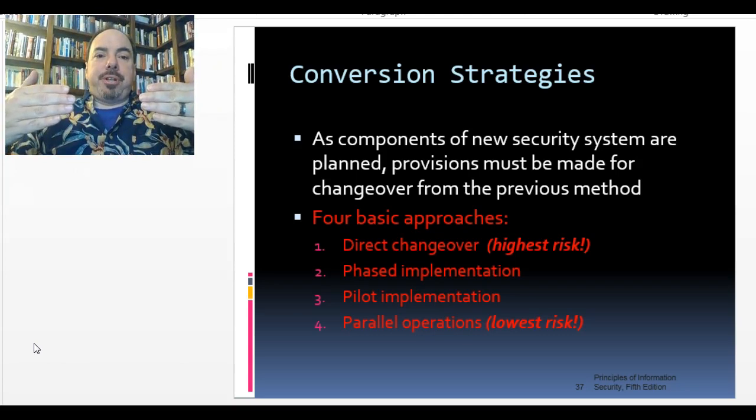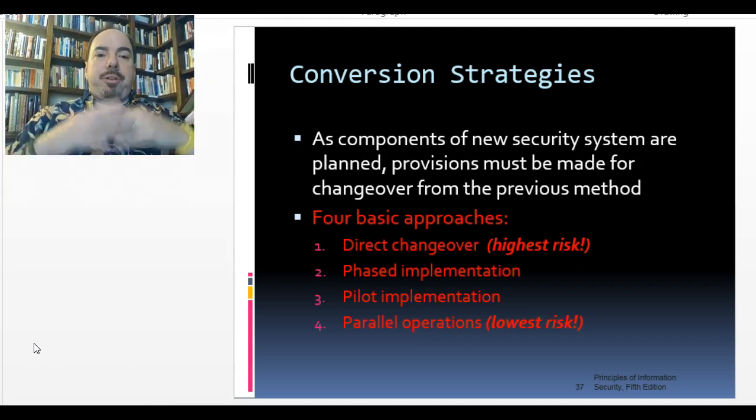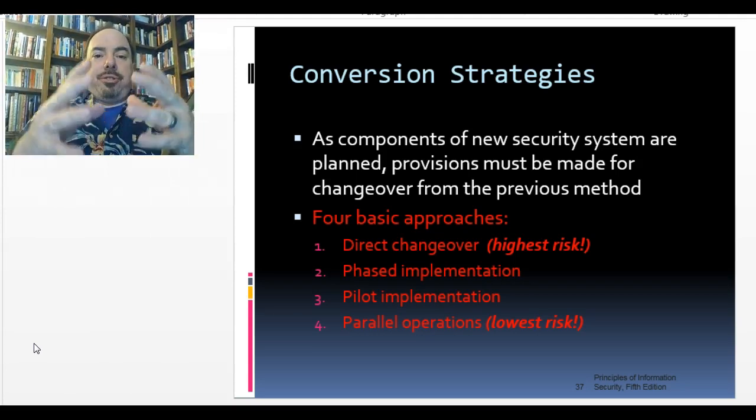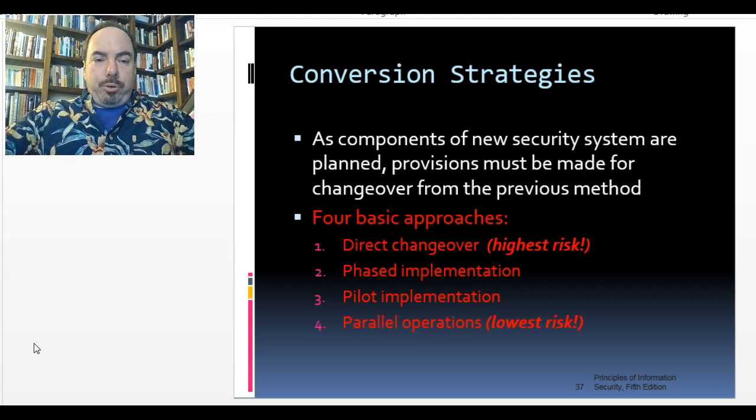So the best example is the SAP financial module, then the SAP HR module, then the SAP CRM module, whereas a pilot implementation would be the whole thing out to a single location, then more locations and more locations, a ripple effect. So please bear those distinctions in mind.